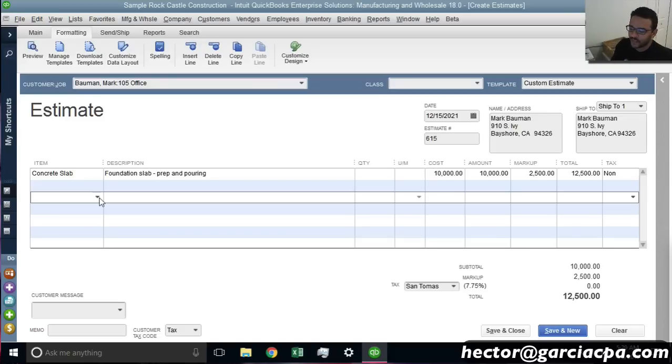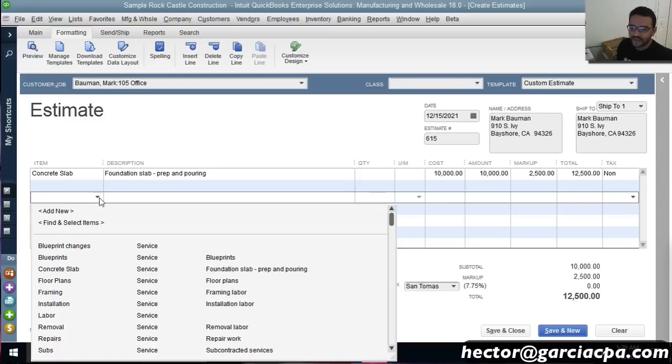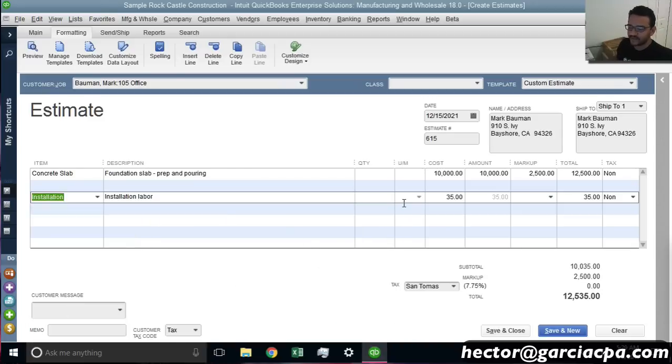Let's say, for example, that I was buying services in pieces or in phases. Well, in that case, I want to use quantity. So for example, let's say installation. Let's say, for example, the installation on the entire project, just to say a number, it's 100 hours at $35 an hour, how much I have to pay. But when I pay them, I'm going to pay them in pieces. I'm going to pay them, 20 hours here, 30 hours here, 50 hours here. So for that, I recommend, instead of just having one lump sum cost, actually break it down with the units.